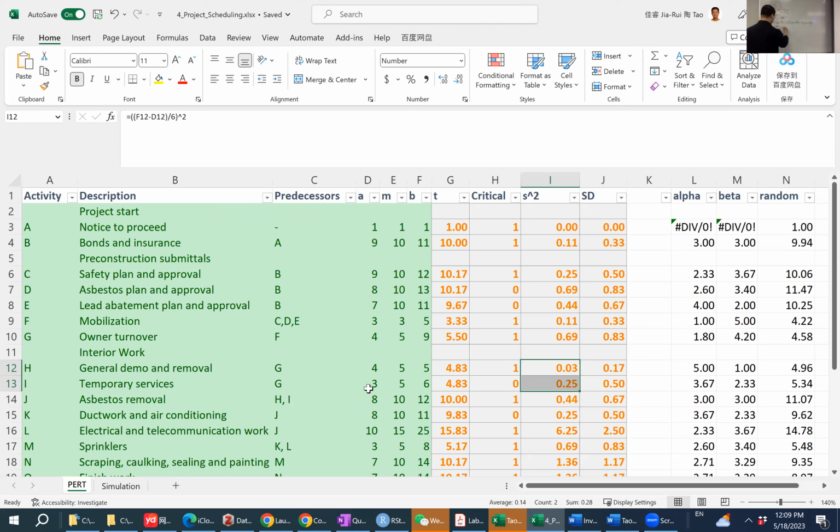It's calculated by using 1 minus the probability that the project is done within 95 days. Since we already calculated this one, we just take the remainder from 1 using the probability of the project to be completed within 95 days.